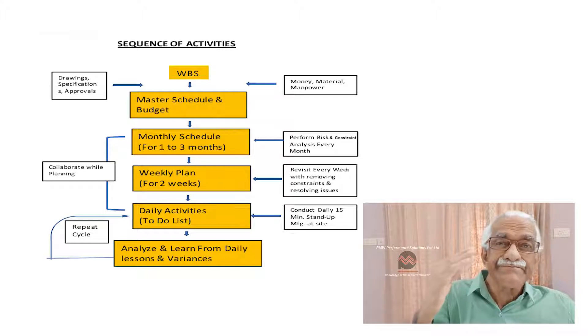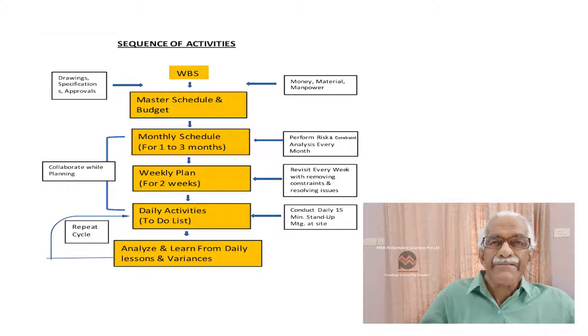Third step. Prepare a master plan. Now, the master plan has got three things: one is the WBS, the budget, and the milestone schedule. So, this is not a detailed schedule, but it's part of something we call a master plan.